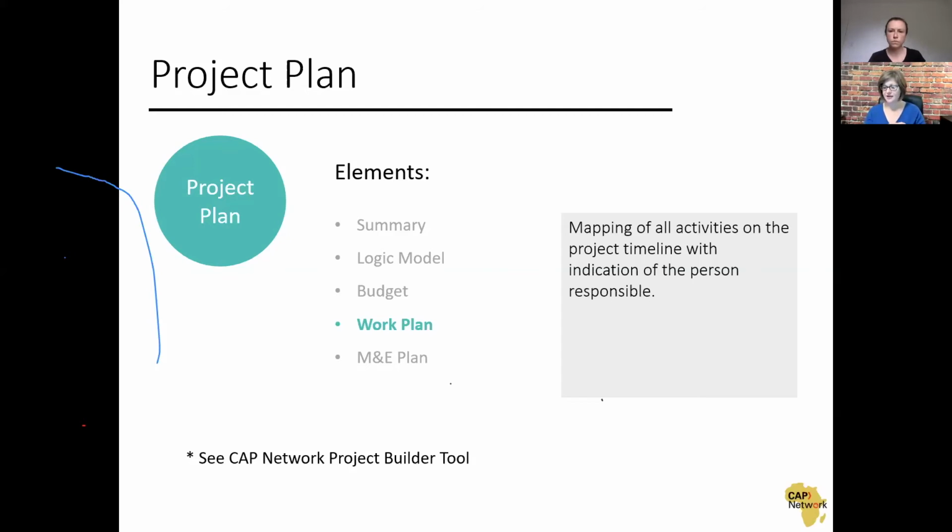So you could say, for example, if you are working with a CAI and you're applying for funding that's not going to go through a CAI, it's going to go directly to your project, you could include the technical advice that you get through a CAI as a cost sharing element. So you can ascribe a cost to what that would cost in the marketplace as something that is being contributed in kind as a cost sharing to your project. That makes sense.